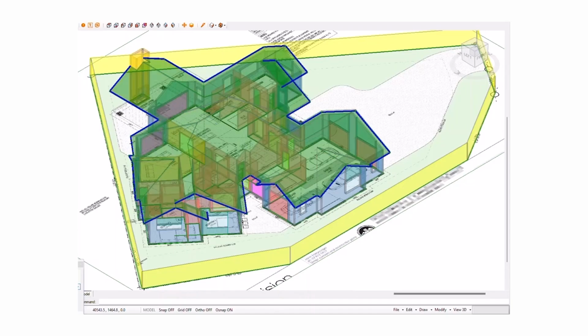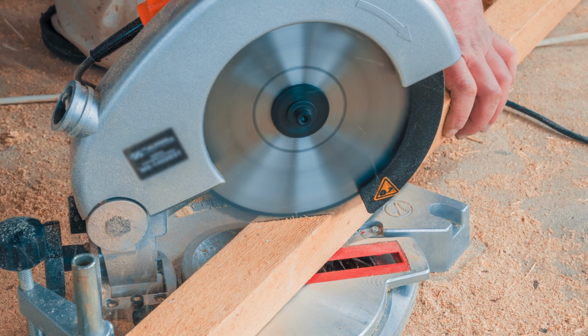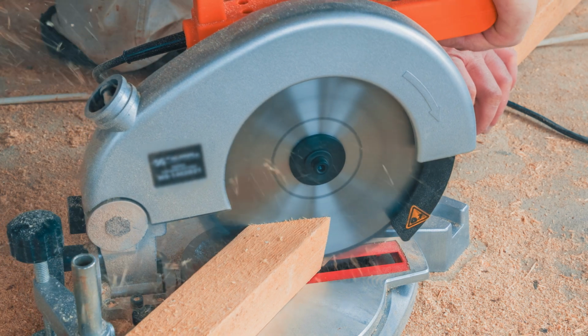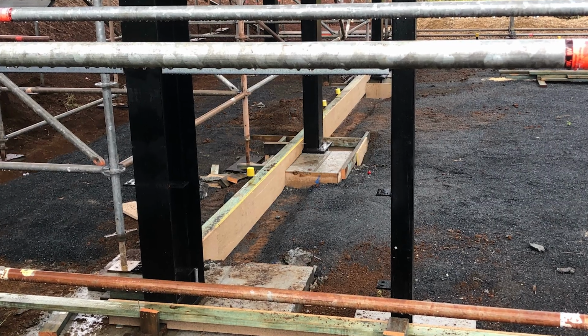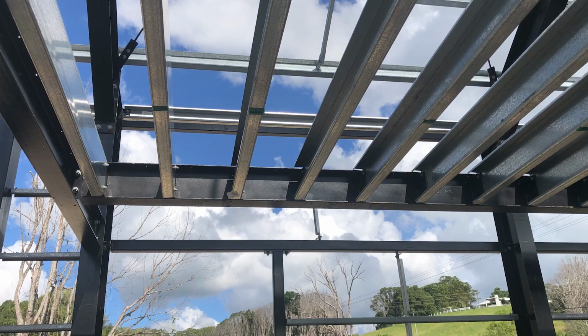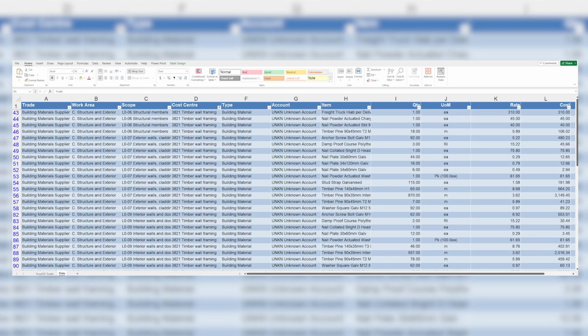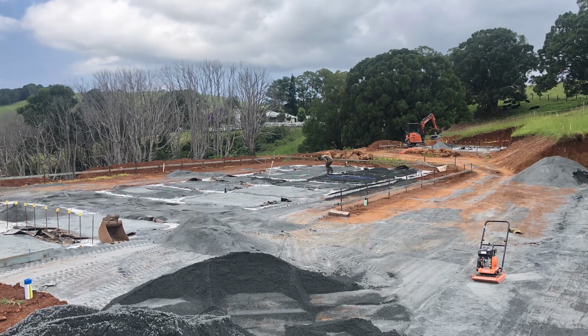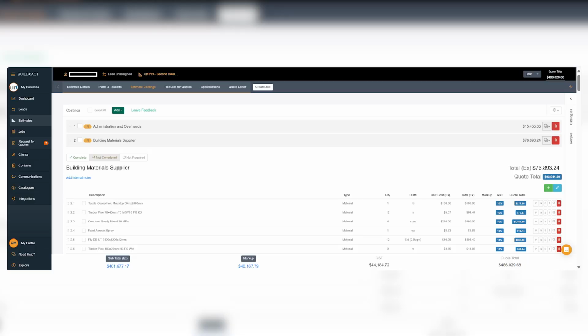In the builder's report, there'll be a detailed breakdown of the labour material quantities. There's also 3D visualizations throughout the report which itemizes out each element. And these are things like interior and exterior walls or the roof, windows, doors. In the client report, you'll see a summarized version of the same thing. It's rolled up to the elemental level rather than having everything broken out. In addition to these two reports, you receive an Excel spreadsheet that has a breakout of all of the costs and quantities that we've relied upon. The Excel spreadsheet will allow you to import this estimate into your project control software and track costs against each of the items we've estimated.